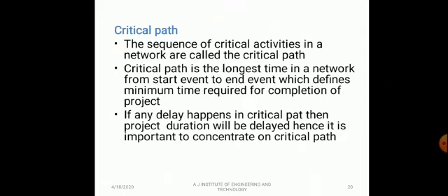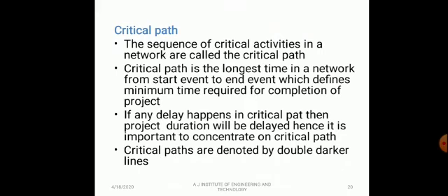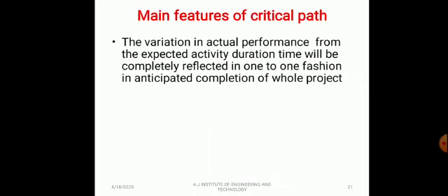Hence, it is important to concentrate on the critical path. Any delay in the critical path will delay the project duration. Therefore, it is very, very important to concentrate on the critical path. Critical paths are denoted by double darker lines. Main features.